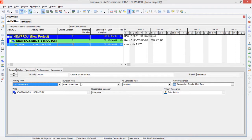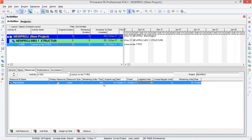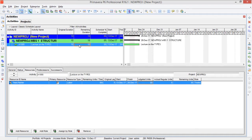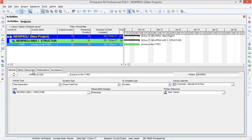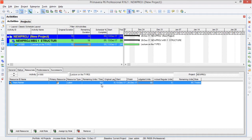Now I keep my duration type as Fixed Units per Time. Our units per time of 8 hours per day are fixed. If I change the duration of our activity to 10 days — in the previous duration type you saw that remaining units per time had changed — but in this duration type, units per time are fixed. After changing the original duration to 10 days, the remaining units per time stays at 8 hours per day but the budgeted units have been changed. That's because the duration type in the general tab is set to Fixed Units per Time — so fixed units per time remain constant while the total units change.